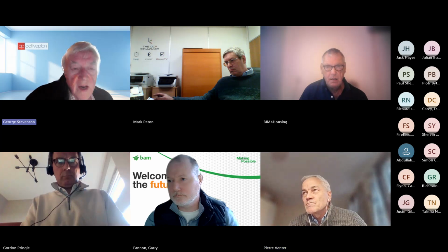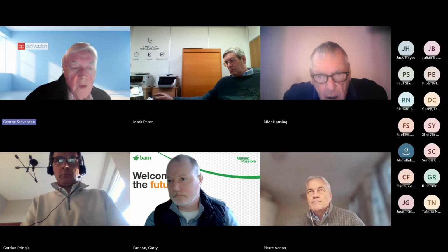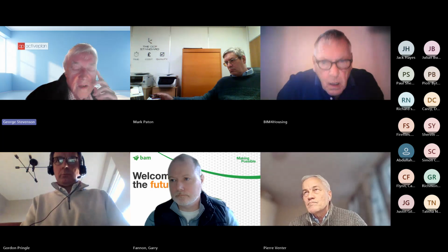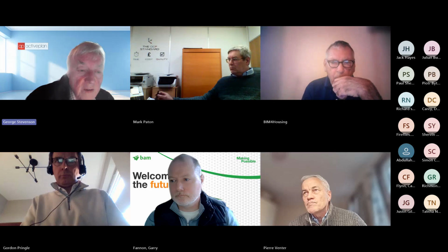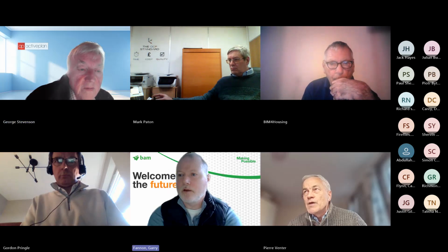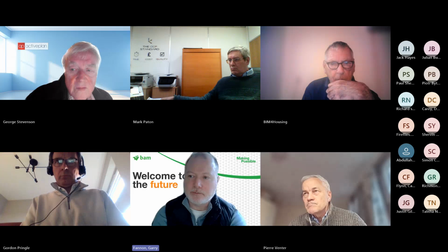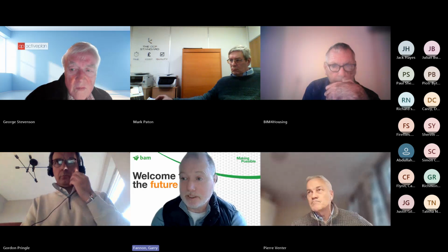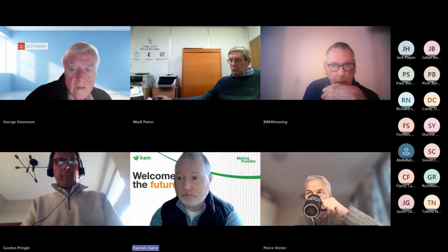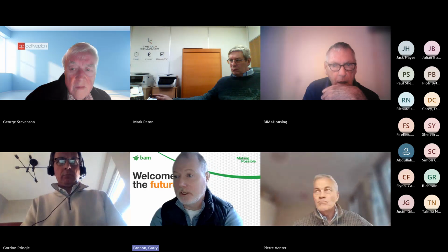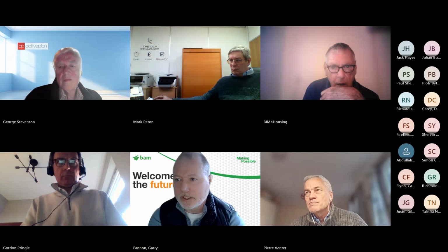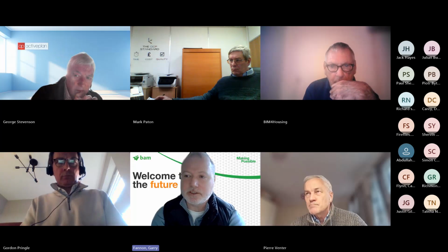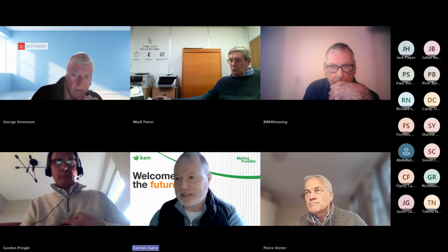The beauty of that, Pierre, is that it would be relatively easy to ask them to just use the 360 camera to snapshot what they've done. From a main contractor point of view, all the way down to the one-man band, we give them a platform. All they need to have is a phone, and they capture imagery. If they've installed a boiler, they'll give us the data associated with that boiler and some imagery of it being installed. That's captured as an asset, and we can then pass that on to our client.